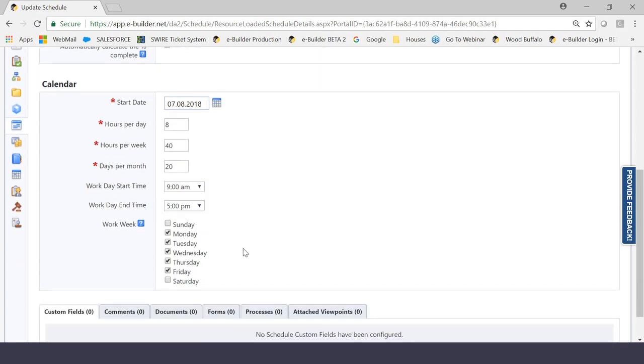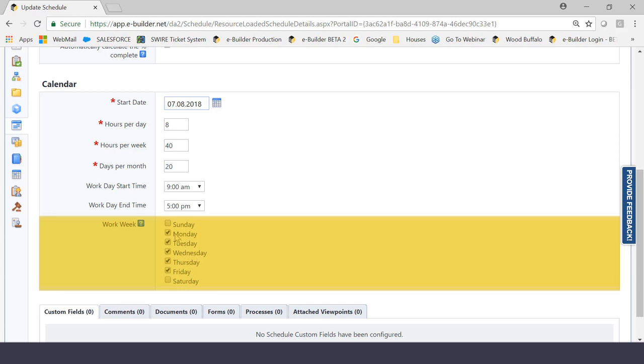Now, if you scroll down, you're also going to see the weeks list here, the days for the week. So you can determine whether your project is going to be a work week project or if it's going to be a 24 hour project. Maybe it's a project that's going to last 24 hours a day and it's never going to stop. Again, important for you to select these to make sure that the schedule understands the rules of engagement of the project. So please be sure that you do this.